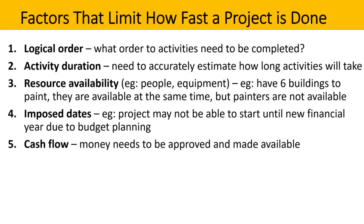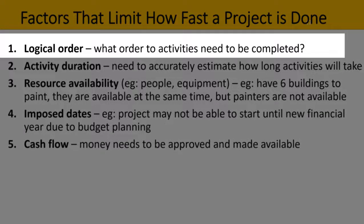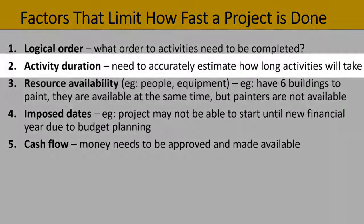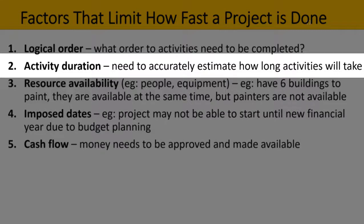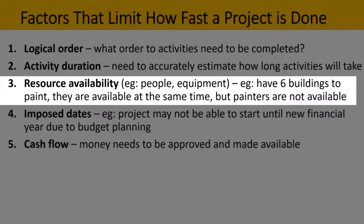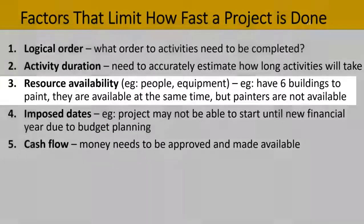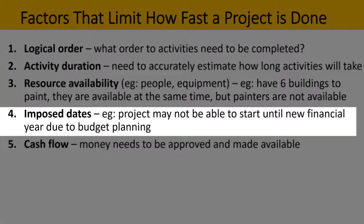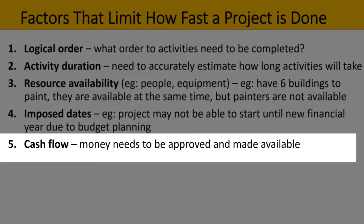Finally, here are some factors that can limit how fast a project can be done. First is the logical order — what order do activities need to be completed in, and there may or may not be flexibility. Second is the activity duration: you need to accurately estimate how long activities will take, and if your estimations are poor, this could affect the length of your project. Third is resource availability — the people and equipment. For example, you might have six buildings to paint all available at the same time, but the painters aren't. The fourth is imposed dates — for example, the project may not be able to start until the new financial year due to budget planning. And the fifth is cash flow: money needs to be approved and made available, and constraints with cash flow can also impact how quickly your project can be completed.